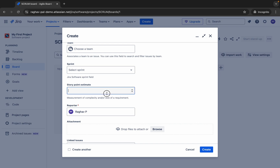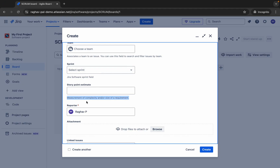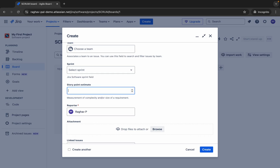You can also give story points, which represent the size of the issue and are used to estimate the work or effort involved. For example, a story point of one can be a very simple and quick task; two or three can be a bit harder; and something very complex and time-consuming can be five or six. You can add story points accordingly, and this field is configurable — all the fields of the issues are configurable.